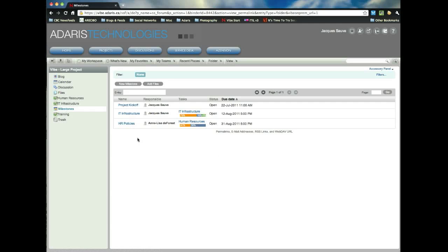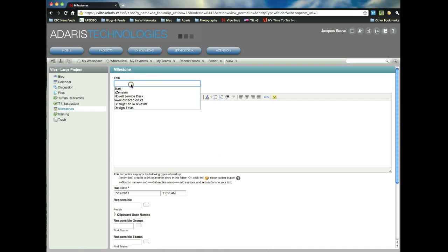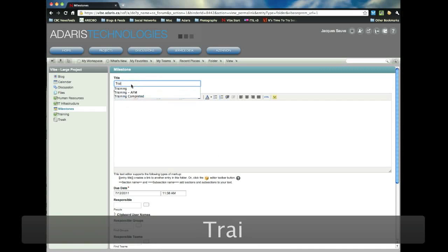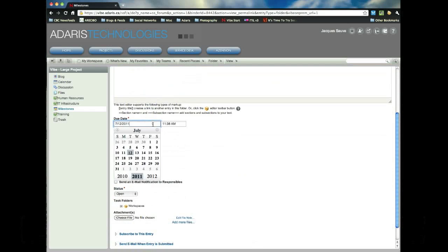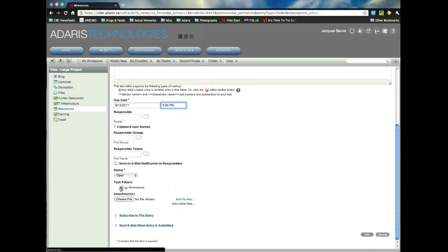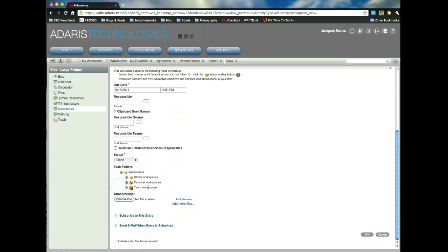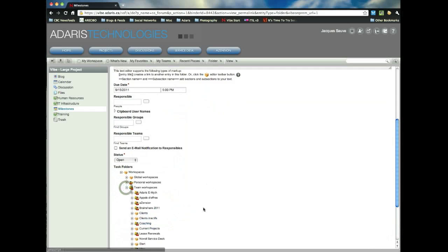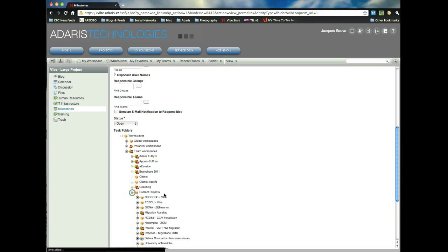Now, how did we create these milestones? Very easily. We're going to create a new milestone that we're going to call training. We want the training to be done by, let's say, mid-September, by end of the day, mid-September. And then we're going to link that task folder to this milestone entry.